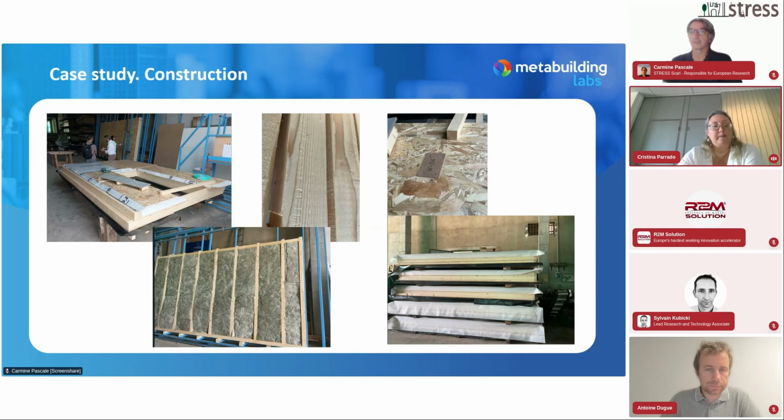The coordination between the contractor and the work stream was crucial. While the civil work was getting underway, the 2D components for erecting the O3BET, the cells and the ward zone were constructed off-site. So we reduced the construction time a lot, and we tried to get very good insulation with these panels. Next one.